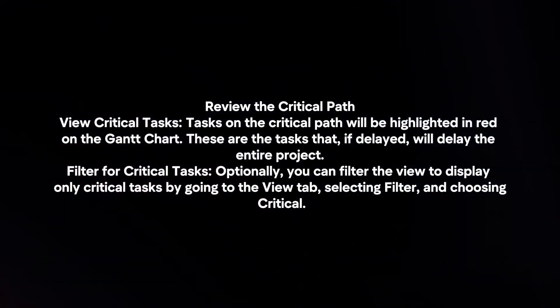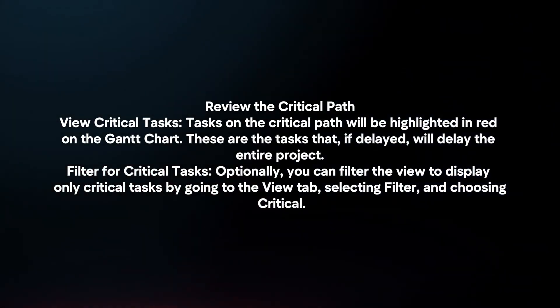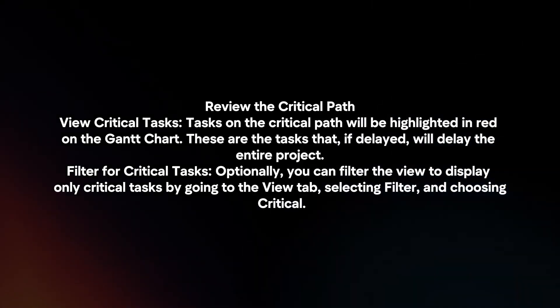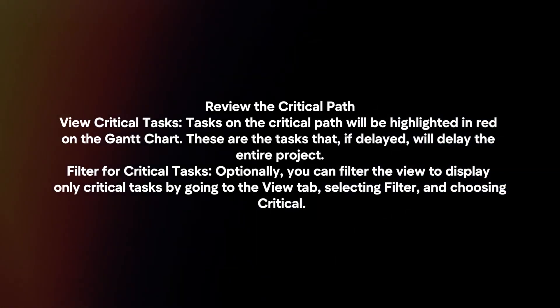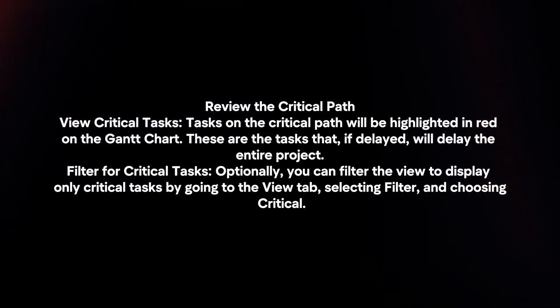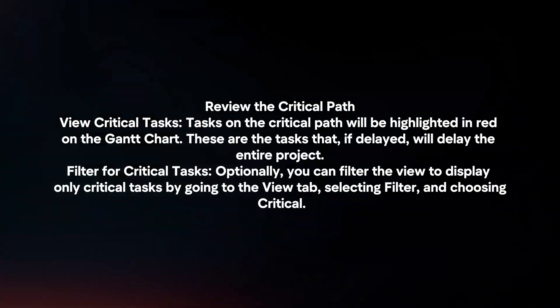Optionally, you can filter the view to display only critical tasks by going to the View tab, selecting Filter, and choosing Critical.